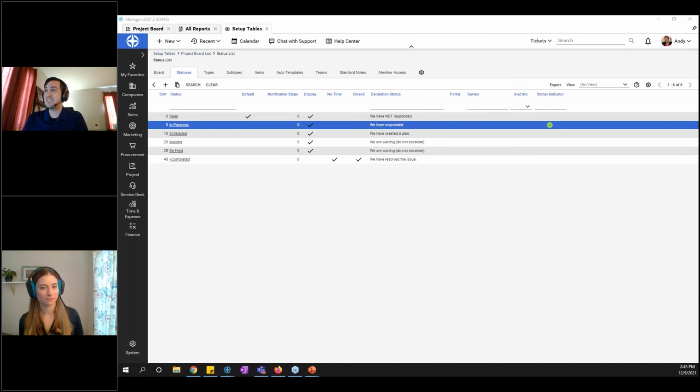In my opinion, yes. It goes back to one of our ConnectWise Manage best practices: all time, all the time, on time. That time matters. The time your project managers are spending reviewing projects is time you're paying them to review. So making sure that time is logged on projects will give you a much more accurate picture of the true cost of the project. Now, that time doesn't necessarily need to be billable, depending on how you qualify that time, but in my opinion, it definitely should be tracked on the project because it is time spent on the project.